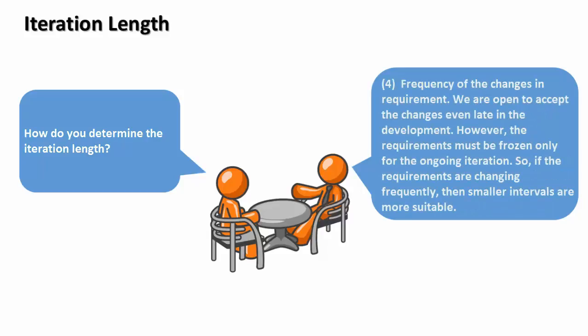Fourth: frequency of changes in the requirement. We are open to accept changes even late in the development. However, the requirements must be frozen only for the ongoing iteration. So if the requirements are changing frequently, then smaller intervals are more suitable.